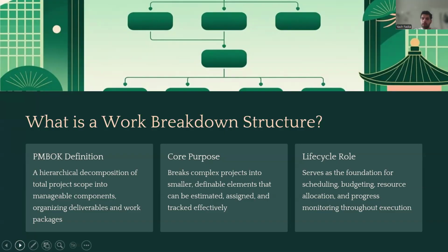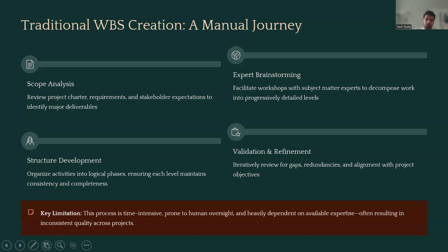Before we talk about improving it, let's dive into what the traditional process of building one actually looks like. Traditionally, creating a work breakdown structure is an extremely manual process with workshops, iterative drafts, and interviews with SMEs. Many common issues plague this: it's slow, and different people have different understandings of how work can be decomposed. Teams often forget tasks that they deem to be obvious and assume that they're already baked into the work breakdown structure without explicitly accounting for time or resources towards it. And novice PMs really don't know where to start in a complicated organization.